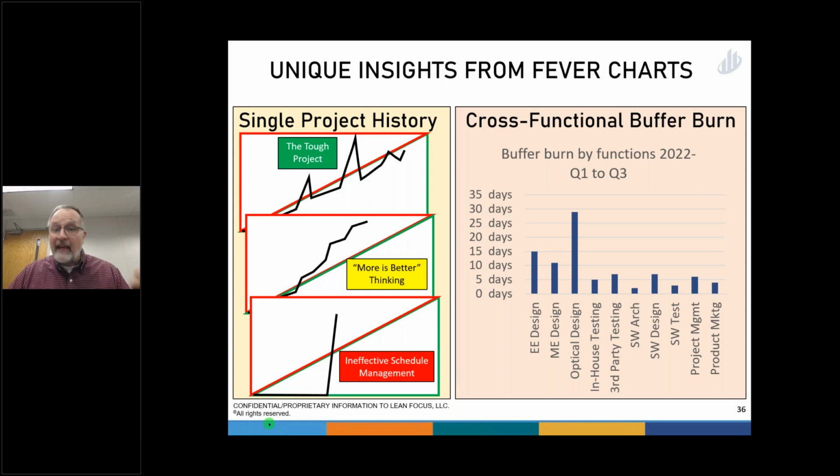Oh, and also, I had my admin prepare a report for me every morning. I spent 15 minutes looking at this report for all 20 of my projects that were going on at one time. I'm looking at all of them. And if somebody's in the red and they weren't yesterday, I want to know about it and I want to see what they're doing about it. So, that's the difference between the first and second.